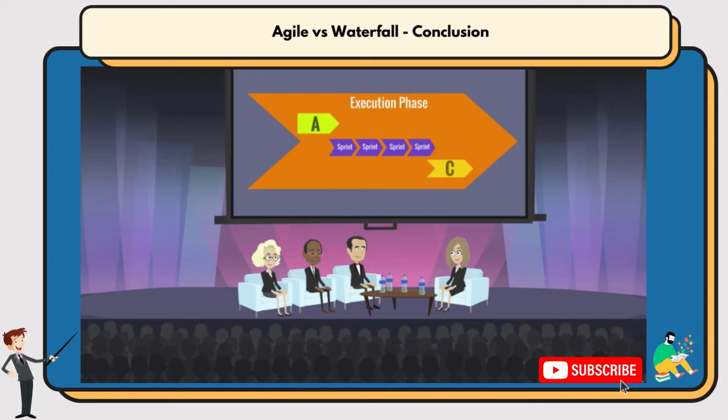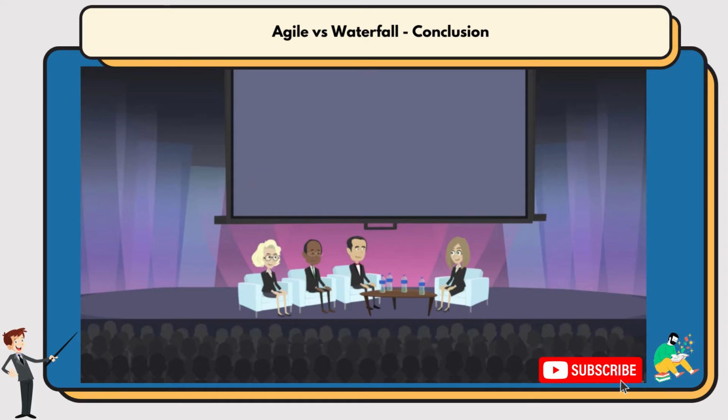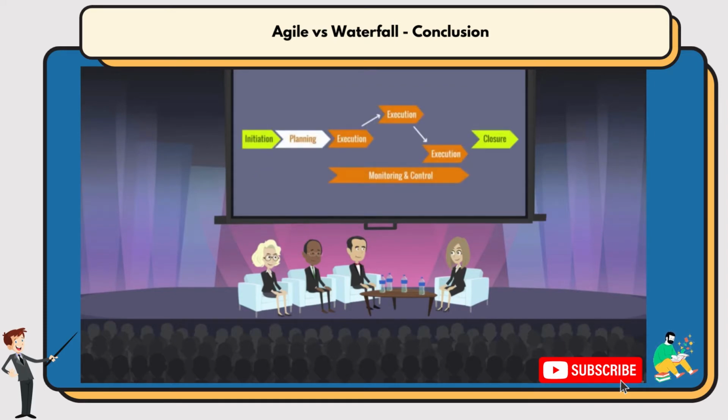Why don't we have parts of the execution delivered in sprints, while other parts move in a sequential and uninterrupted way? E.g., have a project stream performed in sprints, like developing a new system as part of a bigger project. Then, roll out this new system to the users in a sequential way, e.g., demo to all users, train the users in a few sessions and then release for business use. Or have a sequential project which is allowed to change its plan and direction on a few critical points. Or have the client closely involved in a waterfall project and respect the customer centricity principle from Agile, and so on.